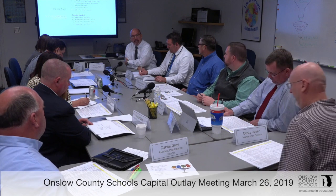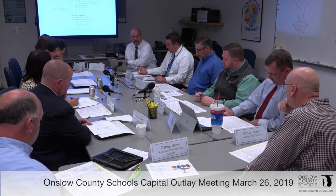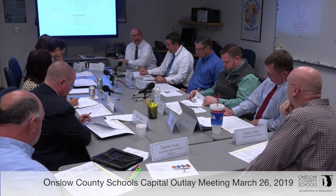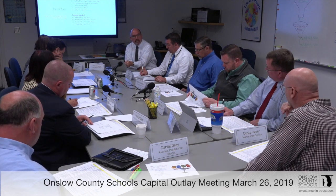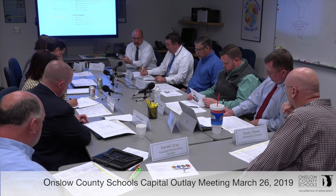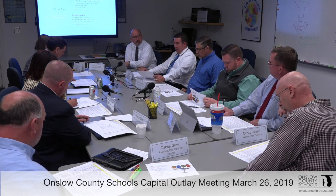The next part of that priority is when we're looking at timeline needed. If we identify that as an A, that means that this has to be done this coming year. If it's a B, it needs to be done within the next 2 to 3 years. If we have the resources available to do it this year, we want to get it done. But if not, it needs to be identified for the next years coming forward. C is for the next 5 years, and D would be for a later date.